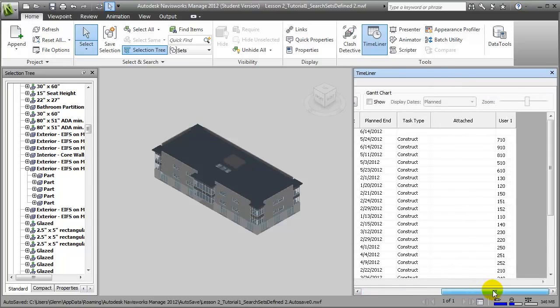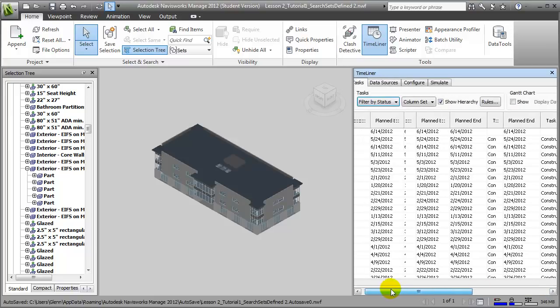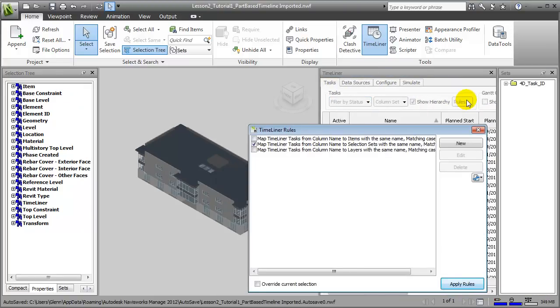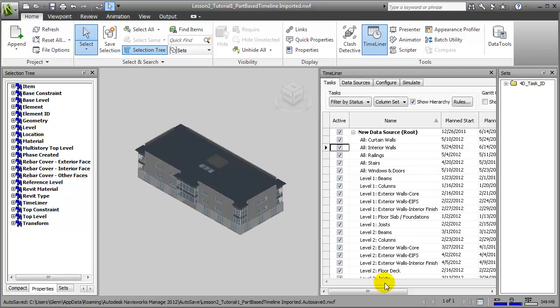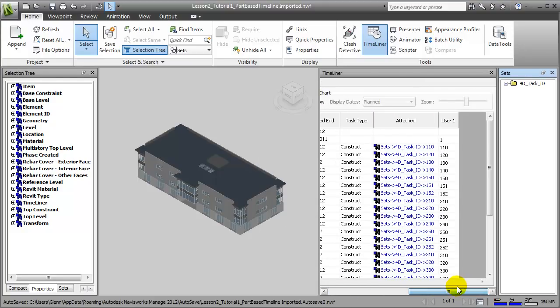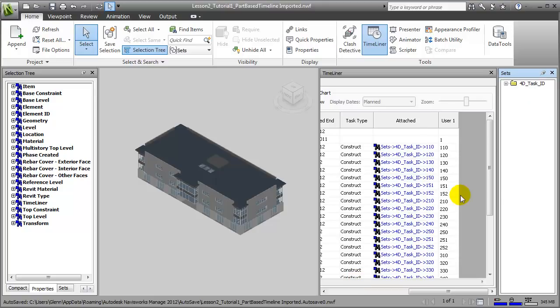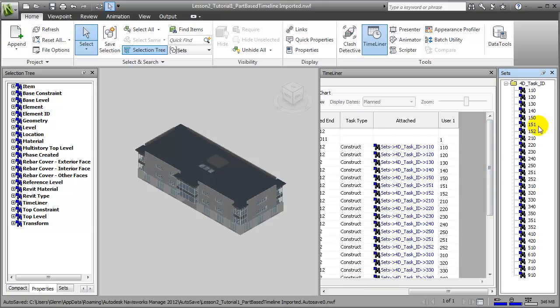If you scroll to the right, you'll see that our attachment rules need to be recreated. To do that, we'll choose the Rules button, apply those rules, then close this window. When we scroll to the right, you'll see that attachments have been made between the different search sets we've defined and each of those different task activities. Remember, you will need to create new search sets for each of the new task IDs in order to have the linking between the building elements and the tasks happen automatically.